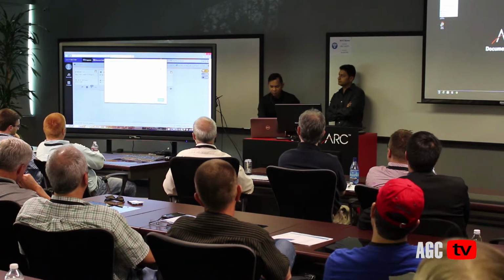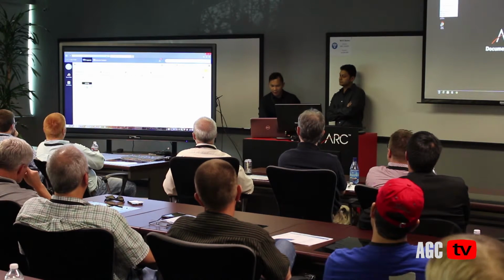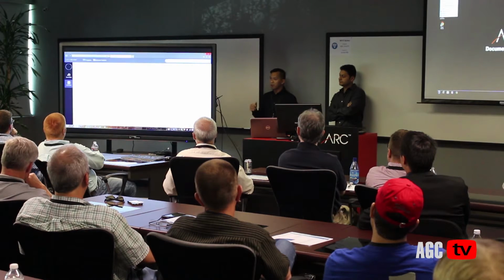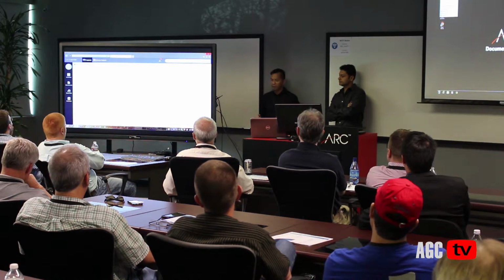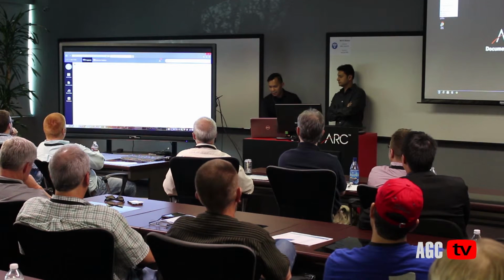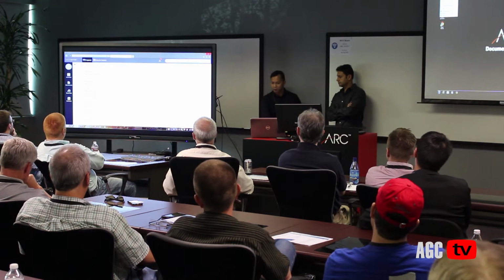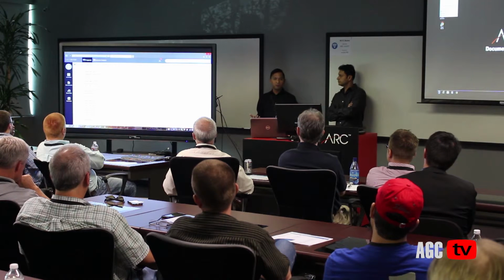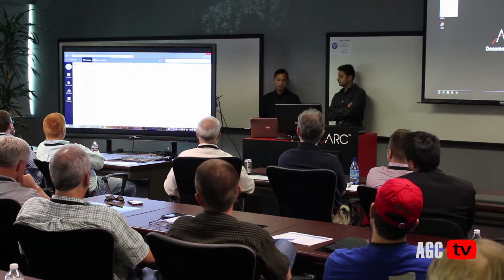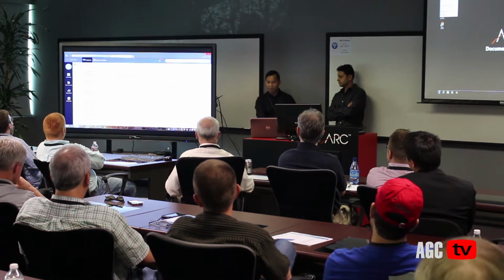And all of that is being tracked in this activity log. As you know, with a lot of folks, it always matters when they submitted everything. So here, we can track everything that's happening within the project. If you have folks saying that they never received the document, they never saw it, you can see here, everything is being captured.